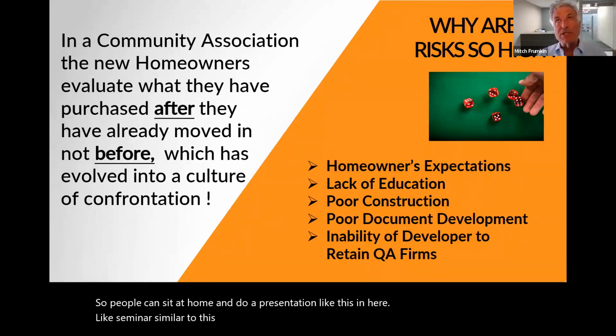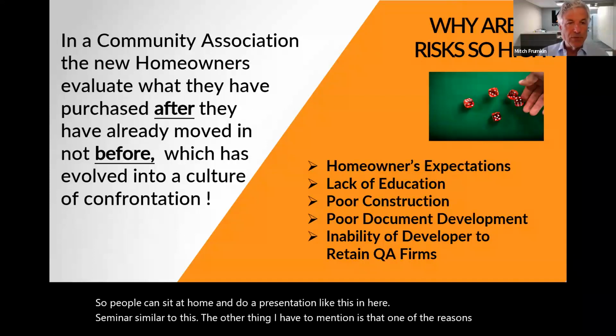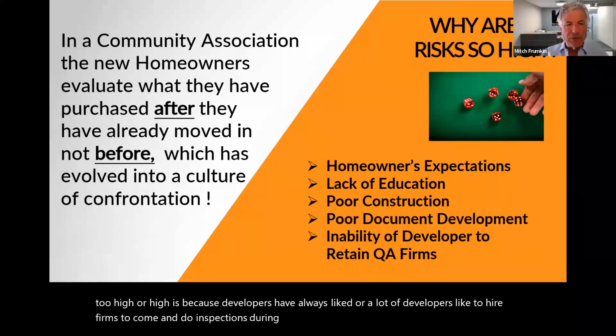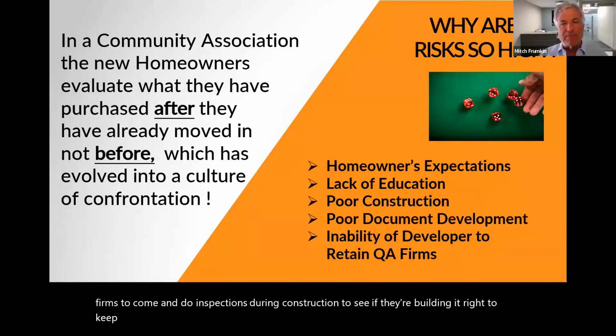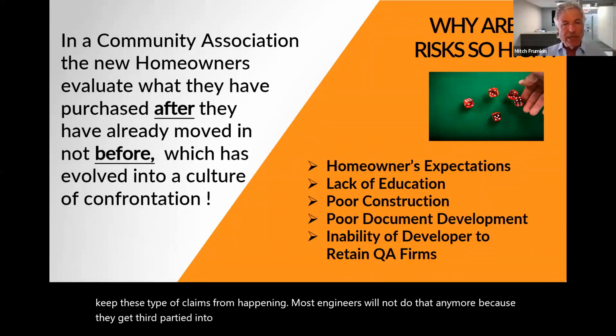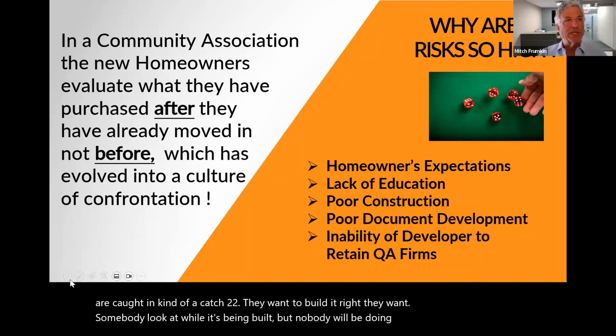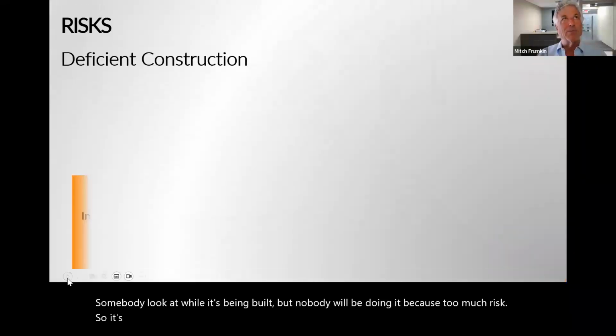The other thing I have to mention is that one of the reasons risks are high is because a lot of developers like to hire firms to come and do inspections during construction to see if they're building it right, to keep these types of claims from happening. Most engineers will not do that anymore because they get third-partied into transition claims, and it's a huge risk for them. So the developers are caught in a catch-22. They want to build it right. They want somebody to look at it while it's being built, but nobody will do it because there's too much risk. So it's a problem.